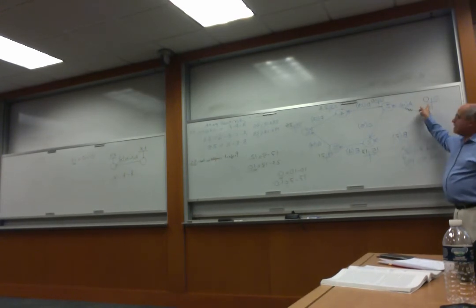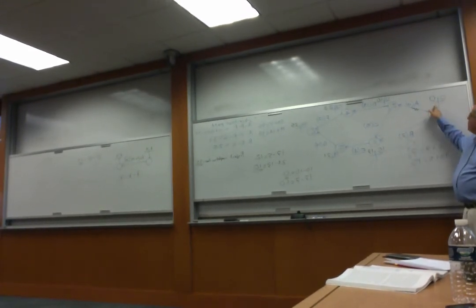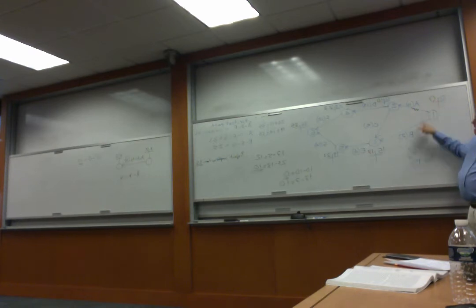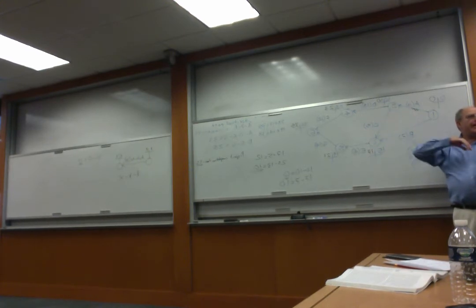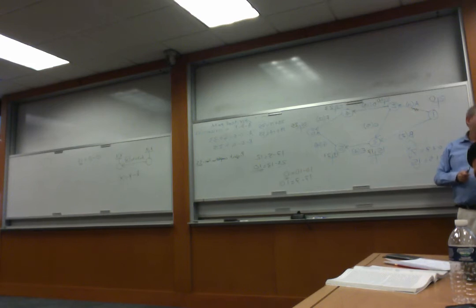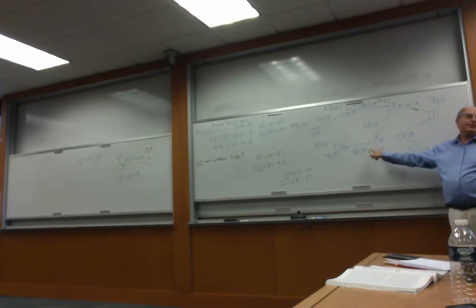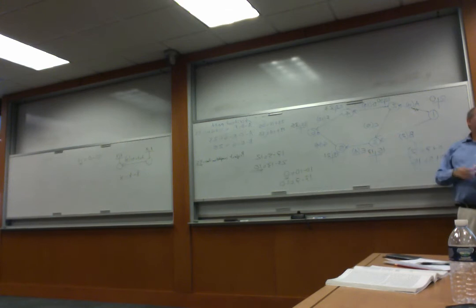Even though this is true, B starts from 1 and equal numbers, but B ends at 3 and we have unequal numbers. One condition is violated, stop the search. So we say B cannot be on the critical path because one condition has been violated. Which condition was violated? That the ending point of B, which is 3, has unequal numbers. So B cannot be on the critical path.